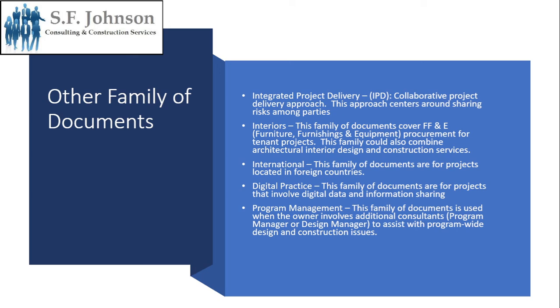So international, a family of documents for projects that are in foreign countries. And digital practice, a family of documents if you use a lot of moving data electronically, and electronic signatures and that type of thing. Then you'll use that set of documents. And then lastly, another family is for program management. This family of documents is used when the owner involves additional consultants, program managers, or design managers to assist with the program-wide design and construction issues.